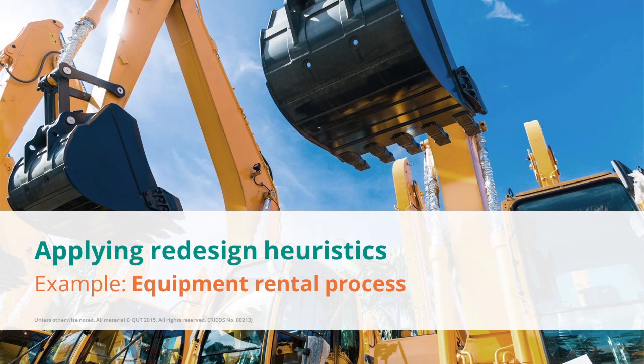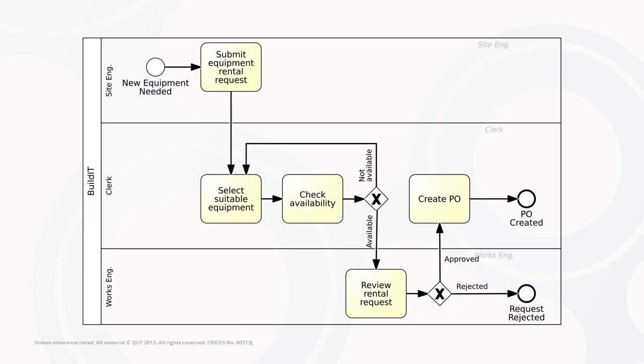We have analyzed the equipment rental process before, and we have identified a number of sources of waste related to the transportation, that is the handovers, between the site engineer, the clerk, and the works engineer. If we apply our redesign heuristics here, one possible heuristic that comes straight to our mind is to eliminate these handovers.